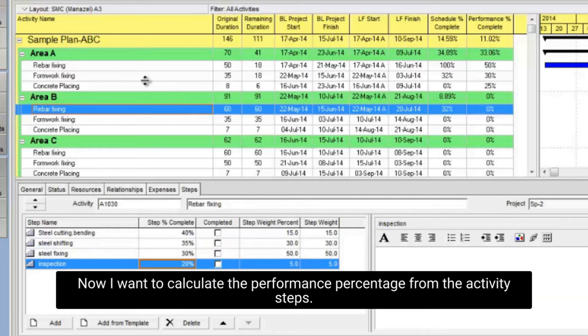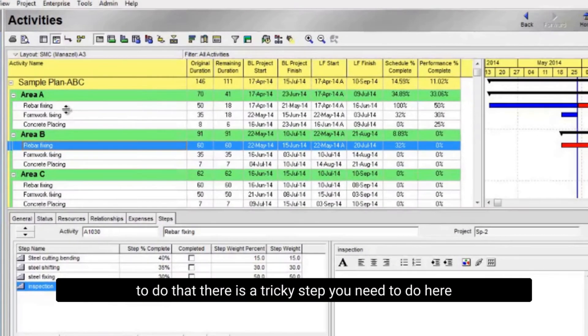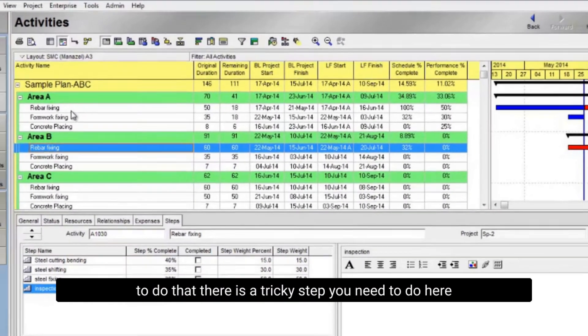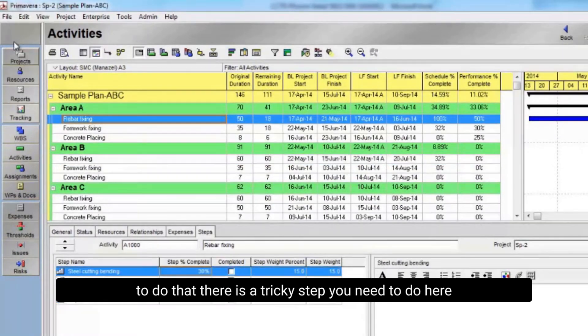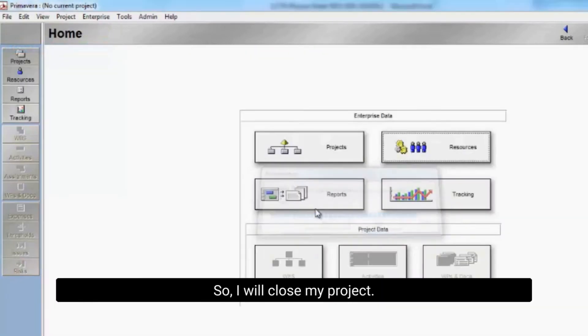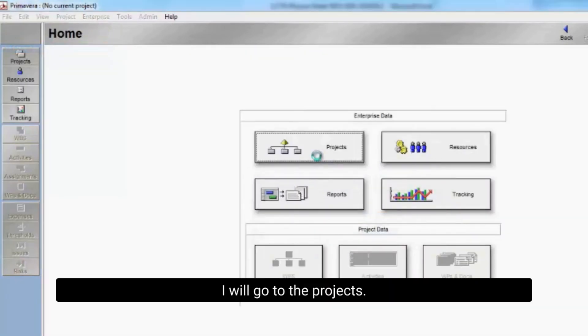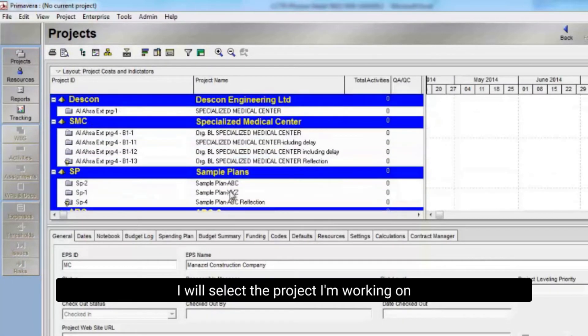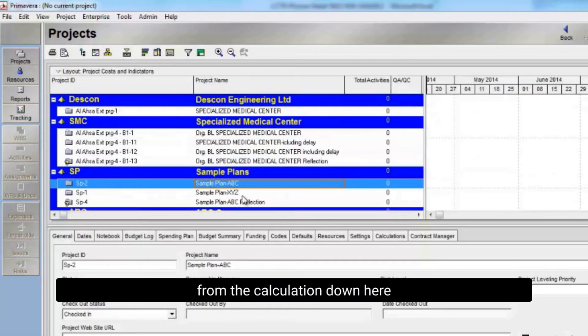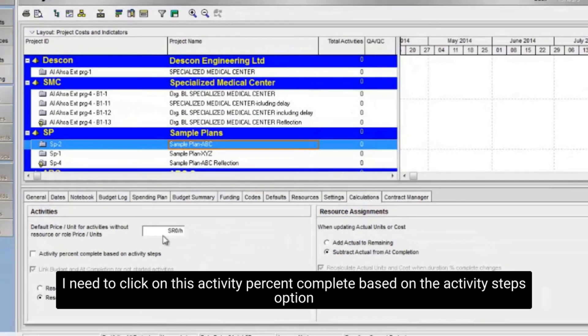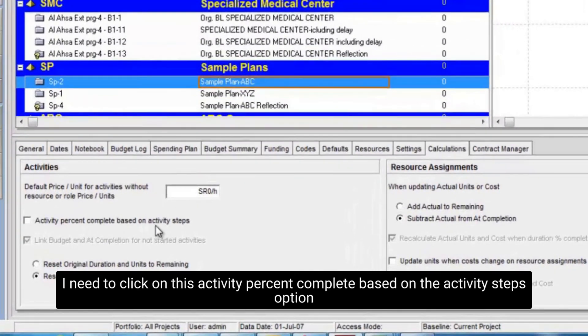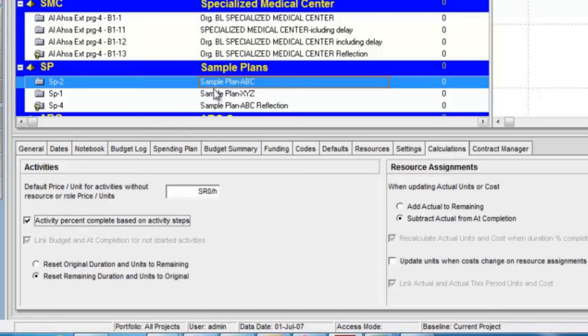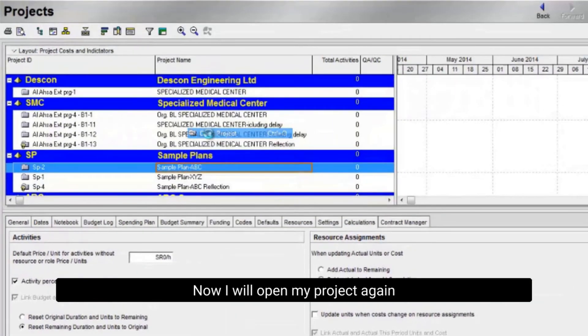Now I want to calculate the performance percentage from the activity steps. To do that there is a tricky step you need to do here. So I will close my project. I will go to the projects. I will select the project I'm working on. From the calculation down here, I need to click on this activity percent complete based on the activity steps option.